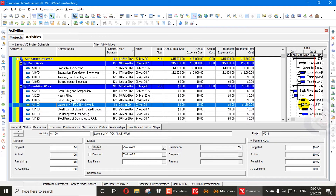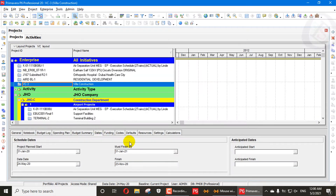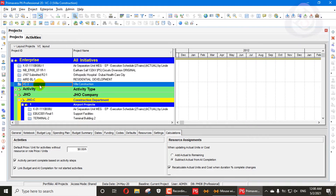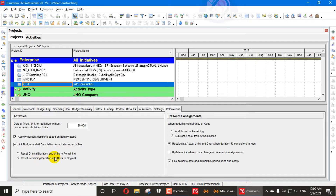You can't delete all the activities in one click manually. Today I will explain how to delete all the actuals and get your project back to its original state. First, go into the project and then to Calculations. I have opened a Villa Construction project. Go here and reset your remaining duration and units to original — you have to click that option to set remaining duration and units back to original.